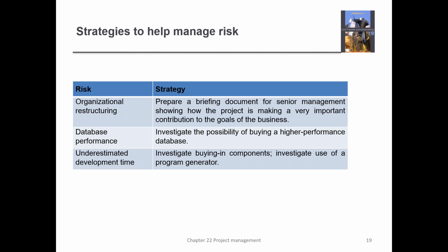What about the cost? Because a machine like that would cost very much. So would that affect the cost as well? And this is where your contingency comes in. So if you have to do something like that, you then start looking at your contingency monies that you had indicated.